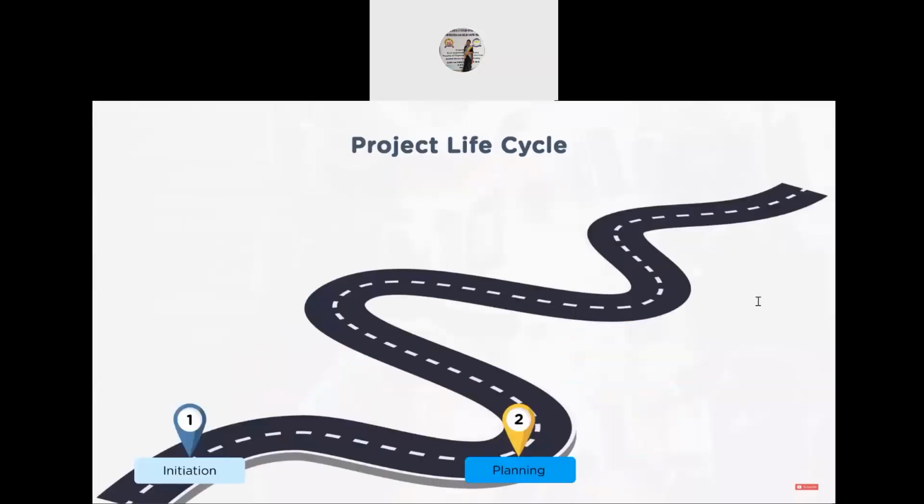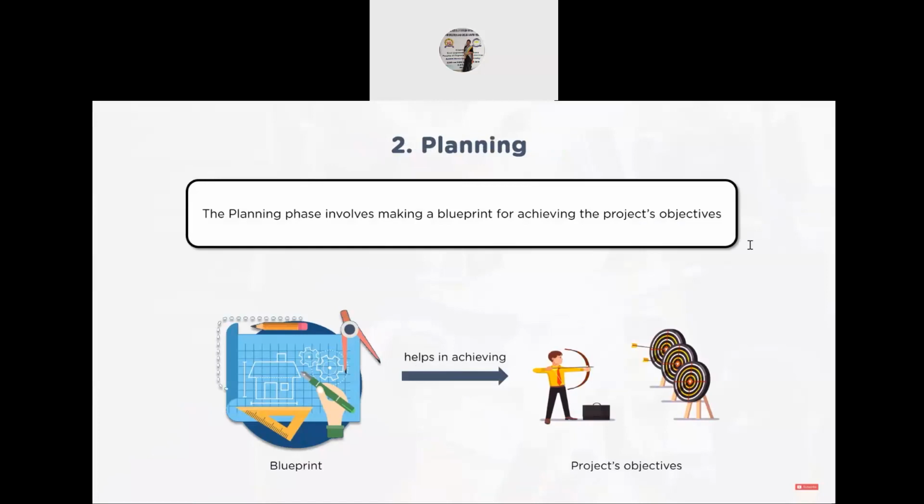Now, next, planning. As we have a basic understanding that, yes, this project has to be done, and a discussion with the key stakeholders has happened, now it moves towards planning. In planning, one will understand the project in its entirety. If it is a waterfall approach, one has to have a clear articulation of the entire project, with comprehensive details and a holistic approach. Now, if you're going in an agile way, in this planning you may have a big skeleton. As you go through each iteration, you may deep dive into detailed planning, if it is an agile approach.